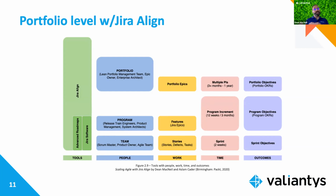And then just like a program increment would be a group of sprints, usually 5 or 6 sprints per quarter, you could now have multiple program increments at that portfolio level epic, because portfolio epics or initiatives by definition will span program increments, just like a feature or a Jira epic would span sprints.